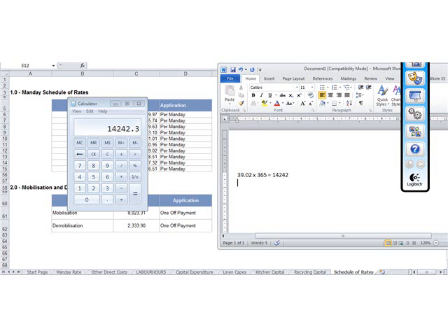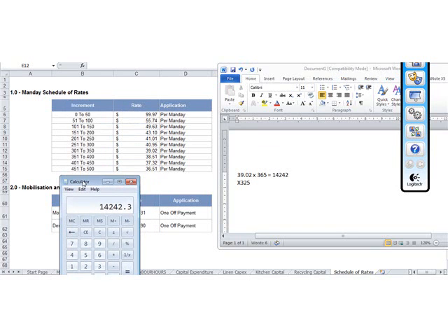So that's per year, but we also need to times it by the number of people being accommodated. And we're going to take the midpoint. So that's going to be 325. So just to repeat, we're just going to this line item 12. If 301 to 350 people were being accommodated, our Manday rate is $39 per Manday.